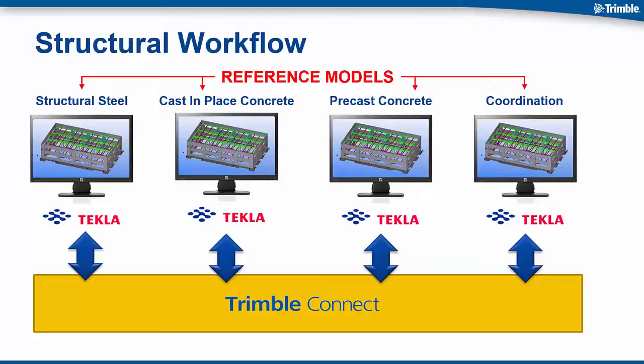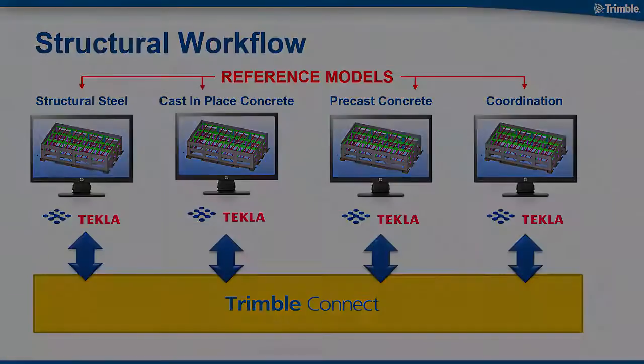And the other advantage of using the reference models and publishing the models to the cloud is that we can control which attributes and which properties and even which objects we want to share and synchronize out. This fosters a protected workflow between the different contractors. It would be very similar to them exchanging 2D drawings, but instead they're exchanging protected reference models, which reduces duplicate modeling and simplifies sharing and collaboration.